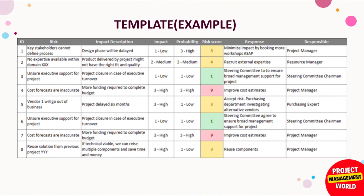This is a simple template example. To perform quantitative risk analysis, you need to quantify what the cost will be if the risk occurs and what the cost will be when you mitigate it — that gives the quantified value to mitigate or accept. That is quantitative risk analysis, which is not included here. After getting risk scores, we prioritize risks by their risk score ranking — the higher the score, the more critical the risk and the more attention it needs.